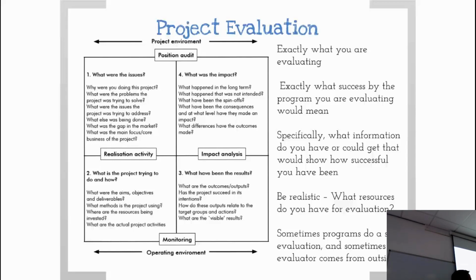What resources do you have for evaluation? A key reason why we don't evaluate a lot of our projects is we don't build it in at the project initiation phase. We don't cost it. We cost up to the final handover of the project if it's for a client, and then we walk away. So you have to actually cost that evaluation and plan it in there as well.